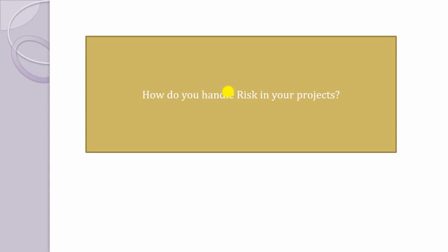and what your mitigation plan is. Another thing could be, from the customer stakeholders' point of view, that sometimes your project is not a priority for them, they don't have time for your project. That could also be a risk, because if you don't follow the process of sign off, then the client suddenly turns up at the deliverable stage and says, no, this is not the product I'm expecting. Then this is a high risk. So every stage has a different level of risk, and there is a way to mitigate those risks.